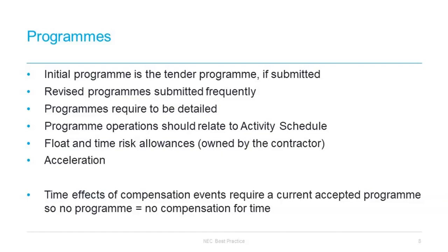And secondly, if a contractor is looking at the impact in terms of what the contractor has missed out on for compensation events because the programme has not been accepted and because there's not an updated accepted programme, if you were to take that sort of dispute to adjudication, then you would be able to ask the adjudicator, firstly, what the accepted programme should be, and point to all the programmes to see which one should have been accepted and when.